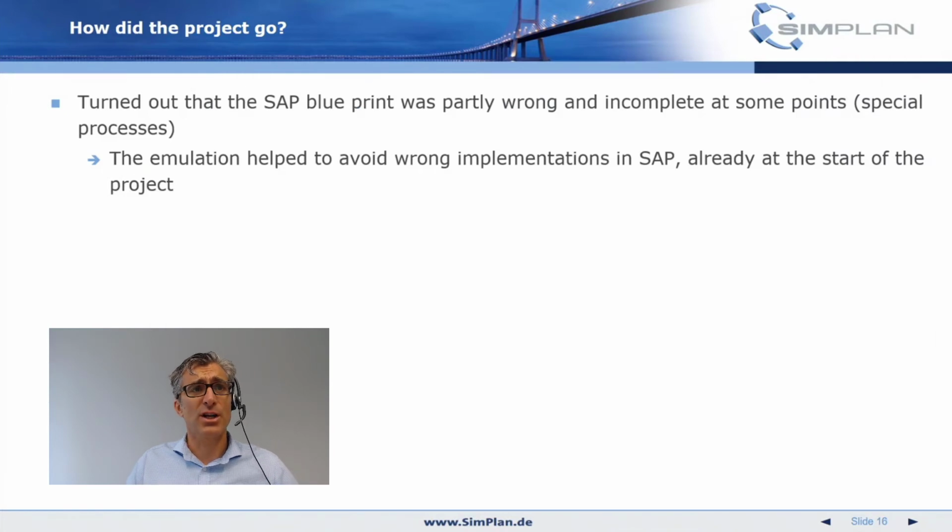So how did the project go? First of all, it turned out that the blueprint was partly wrong and not complete at some point. That was a good thing right at the beginning of the project. It helped to avoid wrong implementations in the SAP system, just by reading all the documents and talking to